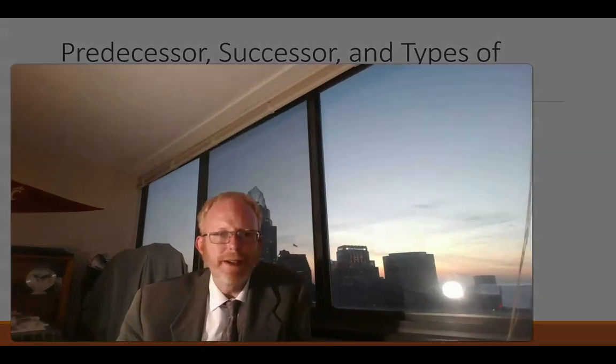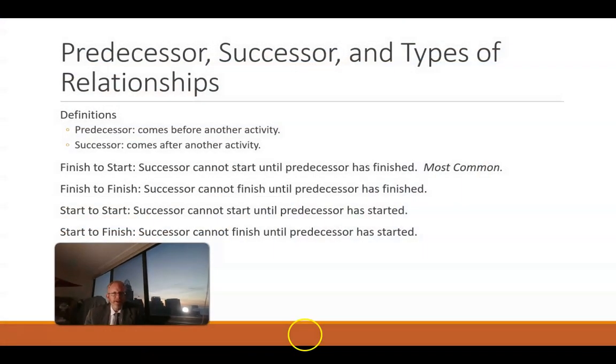This is common in a scenario that I give a lot where we're designing a mobile app, and mobile app developers are mostly doing user interface development, and they're dependent on an API or a service that's being called behind the scenes, probably hosted on the cloud somewhere. Ideally, we'll say, well, we can't start on the user experience until that API is complete. So that would be finish to start.